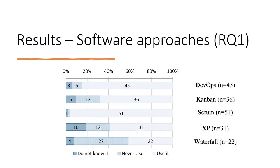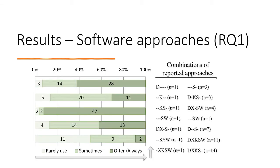For Results, Research Question 1: What are the effort estimation techniques used in agile software development? To understand estimation technique usage, we first examined development approaches. It was found that most respondents use Scrum, followed by DevOps, Kanban, Extreme Programming, and the least used was the Waterfall model. Although Scrum and Kanban are the most frequently practiced, many combinations are reported. Most participants reported using the DXKS combination — DevOps, Extreme Programming, Kanban, Scrum — used by 14 respondents, followed by DXKSW — adding Waterfall — used by 11.